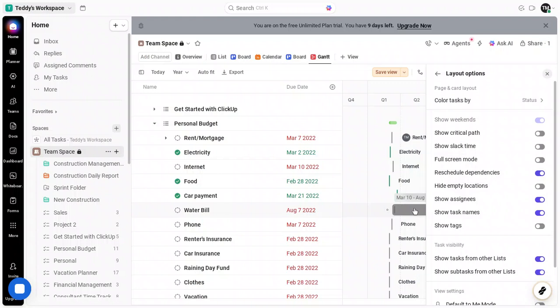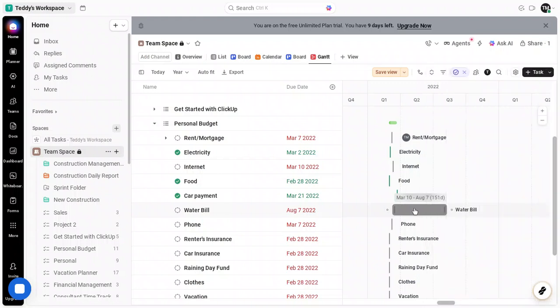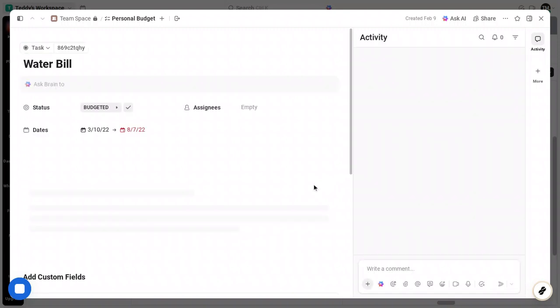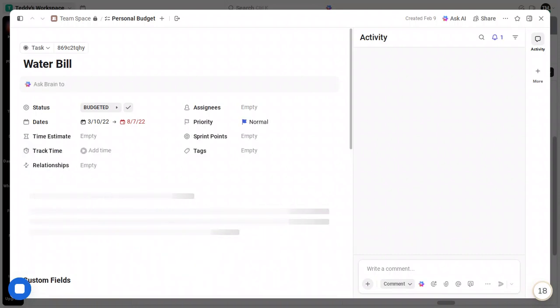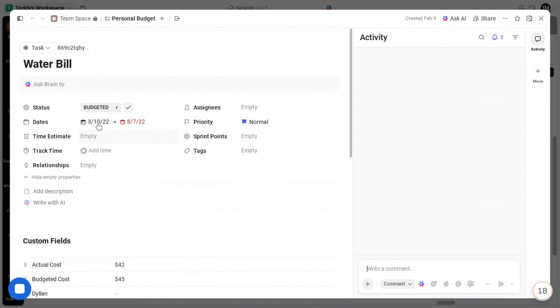Open one of your visible tasks and mark its status as in progress. Then open another and mark it as completed. Status colors are usually standardized by your workspace. Completed is often a particular color, in progress another, and so on. So when you close each task window, the bars on your chart will visibly change to match the new status.